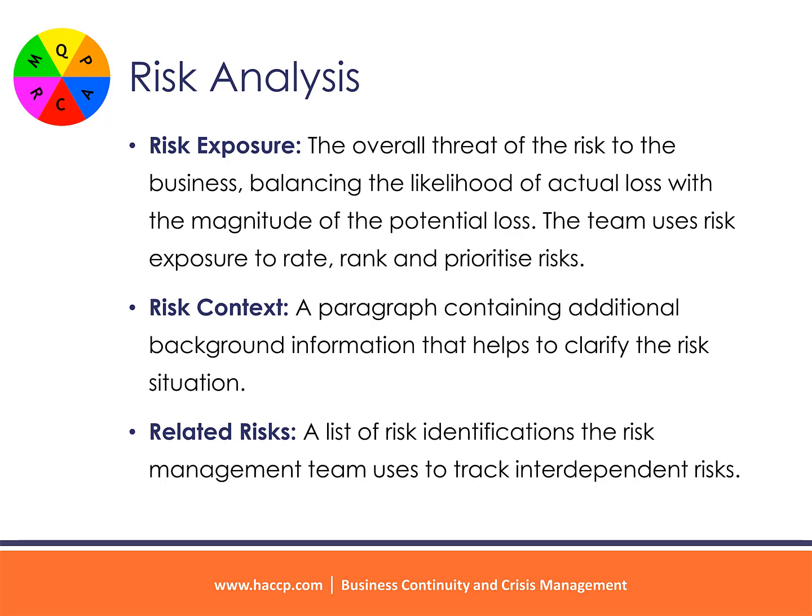Risk exposure, the overall threat of the risk to the business, balancing the likelihood of actual loss with the magnitude of the potential loss. The team uses risk exposure to rate, rank and prioritize risks. Risk context, a paragraph containing additional background information that helps to clarify the risk situation. Related risks, a list of risk identifications the risk management team uses to track interdependent risks.